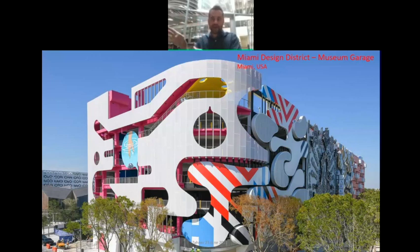and we panelize the system for efficient transport from our fabrication facility to the project site. And then for installation, in theory, it can be very smooth because the installers are really just dealing with a standard attachment method on the back of the panel. All the complexity of the panel is built in the shop, where we can control within our facility a lot better the accuracy of that than could be done in the field.